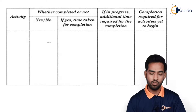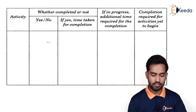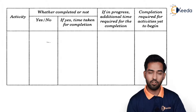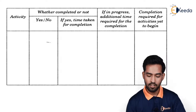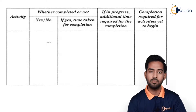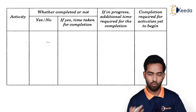In the form, we fill in: whether each activity is completed — yes or no. If yes, the time taken to complete that particular activity. Then event progress — additional time required for completion of the particular activity. Then what completion is required for activities yet to begin. All this data we have to fill in this particular form for all the activities performed and which we have to perform in future.